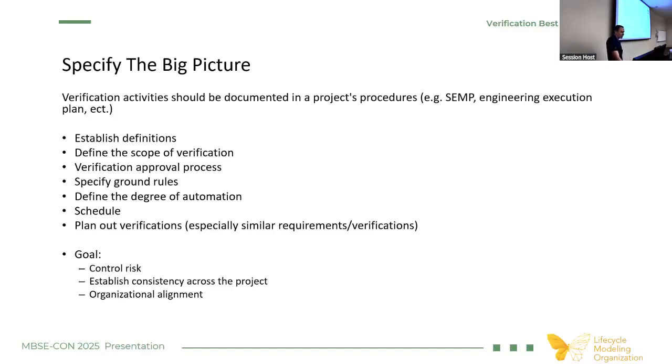Next up, you have the schedule. This is what I would call probably the biggest friction point that I run into with my customer in how we're performing verification activities. The model that Bechtel has been following is how do you burn down risk as early in the process as possible? If I have a verification that is very strictly associated with the design, that should be able to be closed much, much earlier in the process. You don't necessarily need to wait for the hardware to be built. You don't necessarily need to wait till the very end of the project.